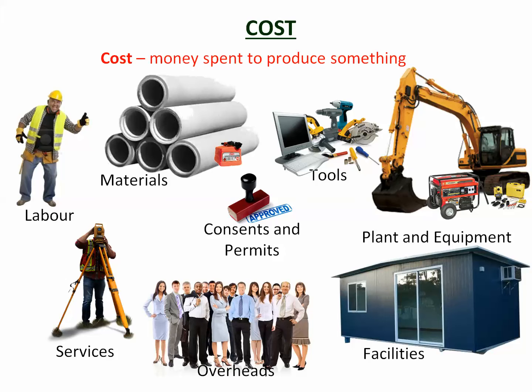For a consultancy design project, they also have costs, but they're a little bit different. So they've got labor, they've got the people doing the designing, the people doing the drafting, the materials, not so much important, but tools, the computers you use. Overheads, there would be the company offices that you're working in. Services, there'd be sub-consultants that you might need. So you might need someone to do your geotechnical investigation or something like that.